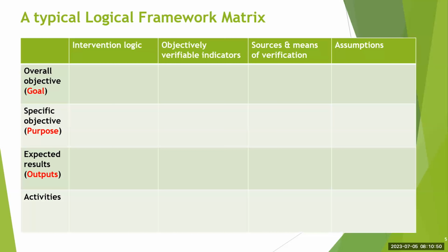Typically, a typical logical framework comes as a 4x4 matrix in which you are able to demonstrate the intervention logic. And we will, in a brief moment, go through what actually constitutes the intervention logic and what indicators you are going to use to objectively verify your results, the sources and means of information for verification, and then whatever assumptions or external conditions that must exist for you to deliver